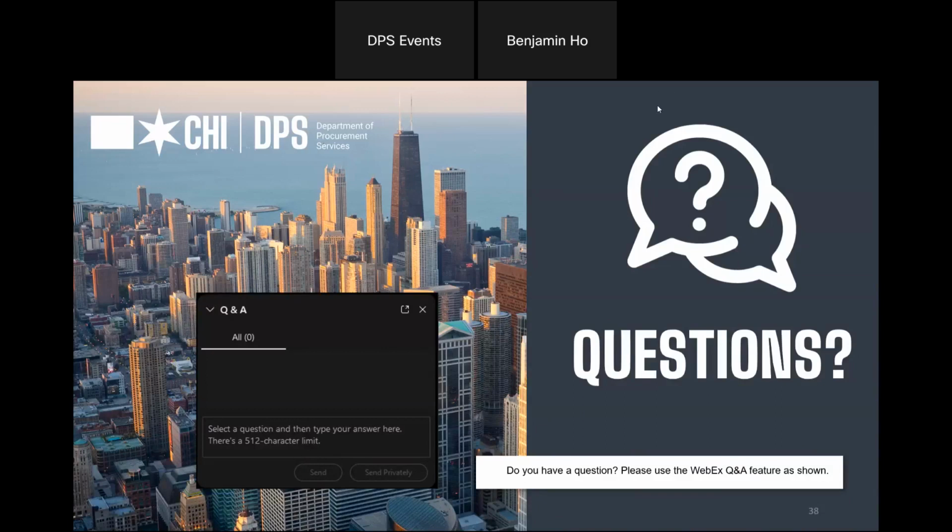All right, that brings us to question and answer. Before we start with any questions that we've received, I do want to say one last thing, which is please give plenty of time for this process. Do not wait until the morning of bid opening to start your bids, particularly if you've never bid online with us before. Your bid should be started at a minimum the previous day, and for your registration, you need to allow at least 3 business days to get yourself registered before you even bid.